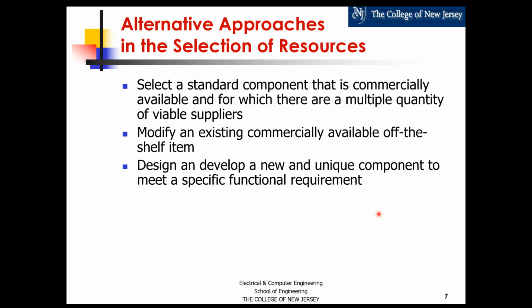It may be that you can take something that exists and, if it doesn't fit quite well, start with that and modify it. But then someone started that and designed that. There may be licensing fees and royalties, essentially paying for the intellectual property to use that and modify that design. So that needs to be part of the decision-making process as you analyze it.